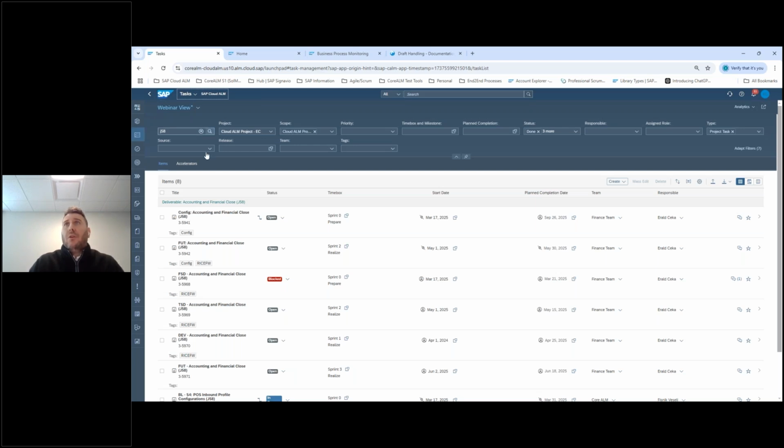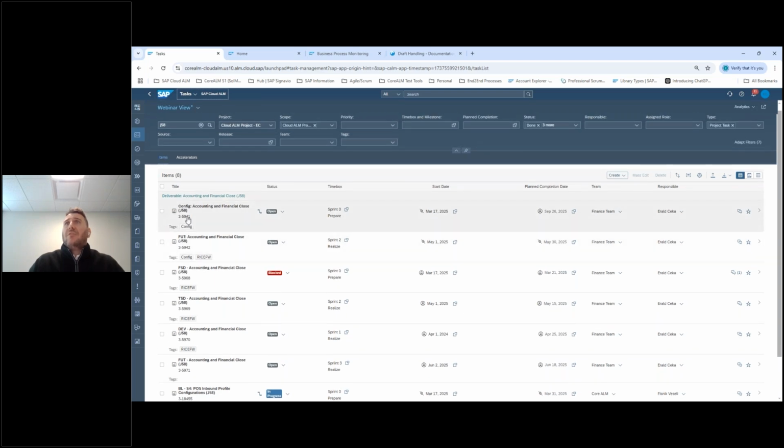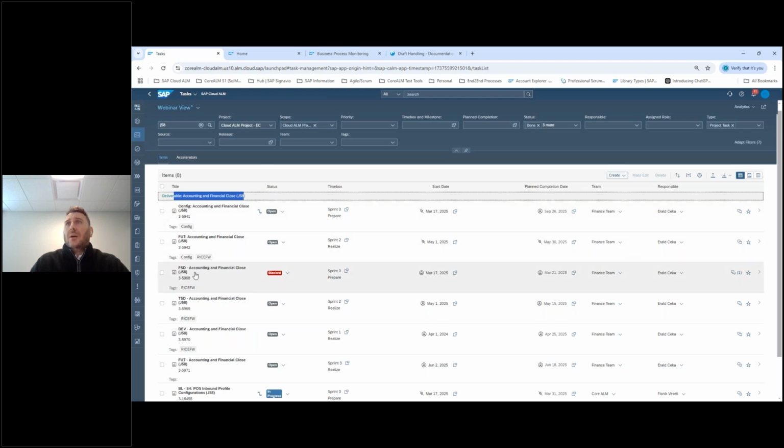We've had implementation where we choose both for our demo purposes here. What I've done is I've assigned them at the task level. So at the project task level, you can see that there's, for example, for this requirement, J58, an FSD, TSD development work and FET that we need to deliver as part of this requirement. So we actually have broken them down into tasks, and this is how we can actually manage those.